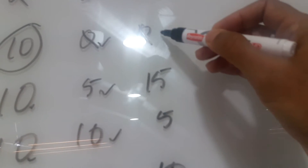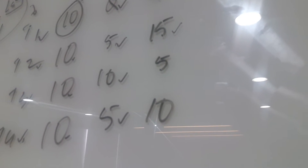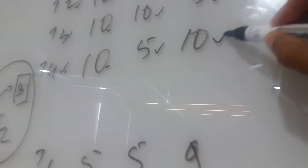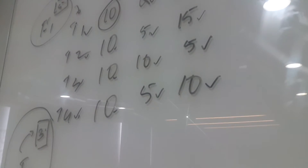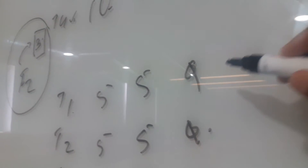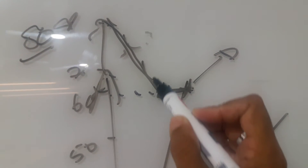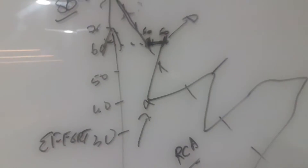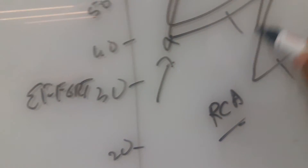On day 2, a completed task stays at 0. One task that was 5 became 15 because the engineer now feels they need 15 more hours — no questions asked. Another task went from 10 to 5, and another from 5 to 10. The assumption is that when the engineer gives an estimate after working on something, that must be the most accurate estimate. After the second day, we get a total that in this case, coincidentally, is also 60. So the burndown goes horizontally because the previous day was 60 and today is also 60.